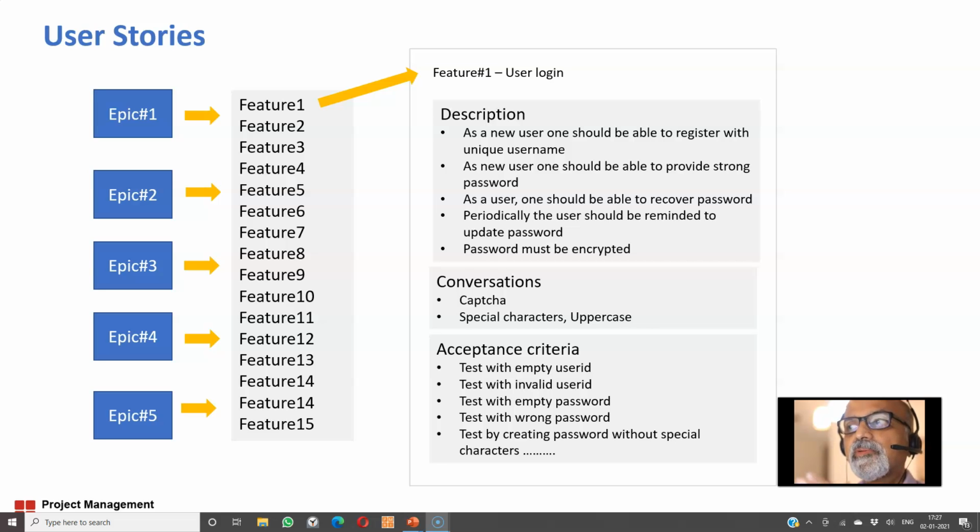With the user story, we will be able to come out with excellent estimates, and it is a great way to communicate the features to the relevant stakeholders. And while expanding a feature into a user story, the product owner will get enough time to think through the feature. That means before getting into planning meetings, the product owner has done his homework, and it becomes much easier to conduct an effective